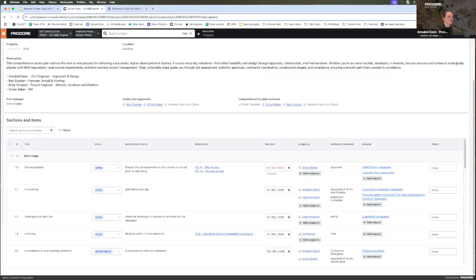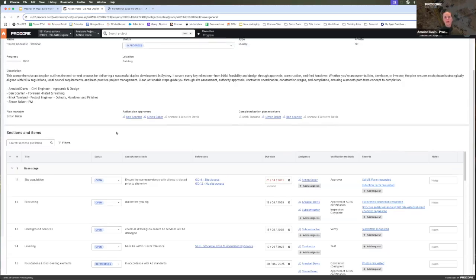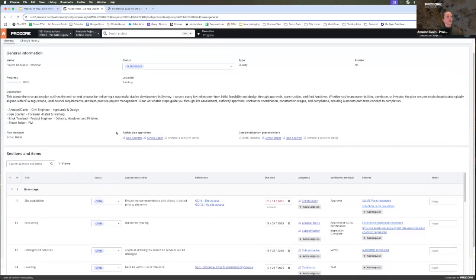Yeah, I think Simon, for me, having run ITPs or action plans out on site, it was always paper-based and it was always sort of owned by the site engineer or a graduate engineer. And that was never shared broadly. You would just turn up on the day with your piece of paper and request that somebody sign off on something. Or maybe 12 hours prior or 24 hours, whatever it said in the contract, you'd write to the client to say, I've got a hold point or a witness point. But I think it's a really good point to dial in that collaboration piece because you're taking everyone on the journey of what's happening on site, as opposed to just always being on the back foot of that organization to get those quality items signed away.